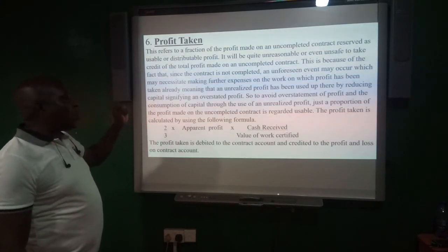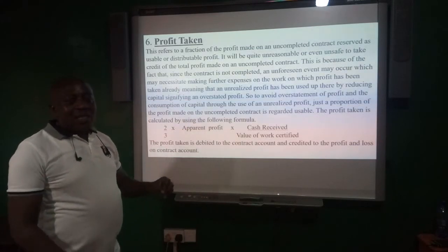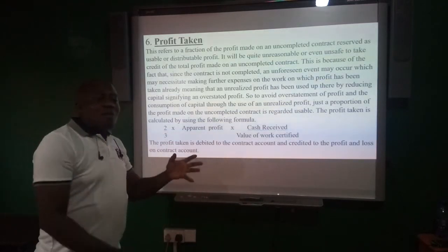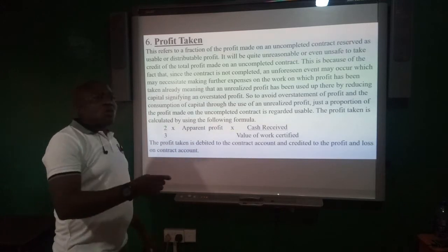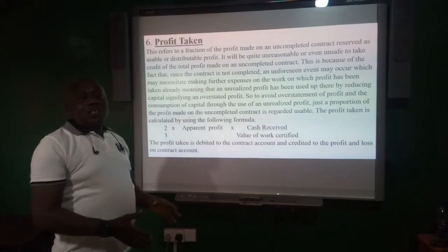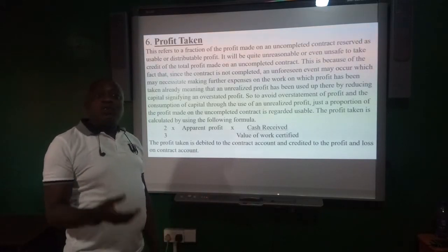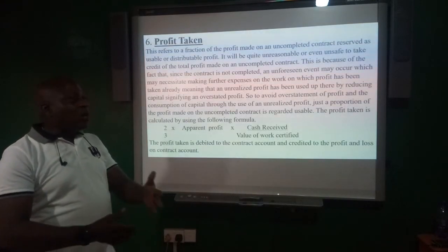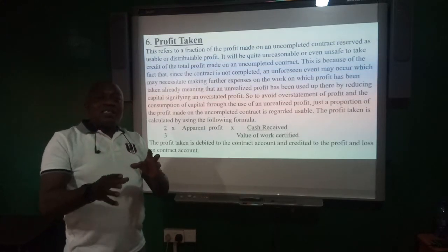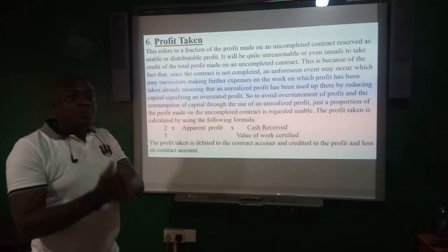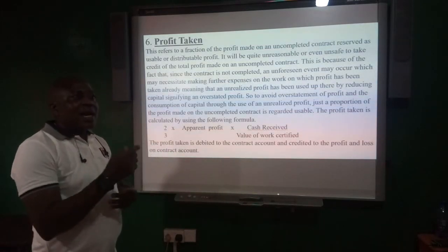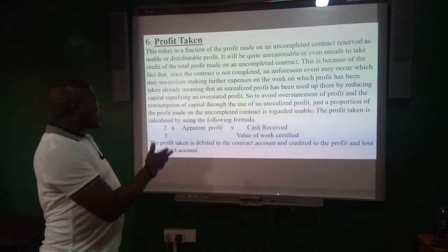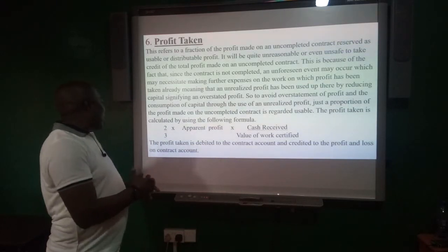I want to go over this one. Profit taking. All that I'm trying to tell you is that since you are to execute a contract which may transcend over several years, you cannot say, oh, if I finish, I'll get this profit, so now I'm taking this profit out. If you do that, when something happens in future, it's going to affect the contract. So there is a formula you have to use so that you can take a profit out of the work that you have done, so that some of the profit will remain till you complete the work and then you take all your profit. So the formula is, you look at 2/3 of apparent profit times cash received over the value of work certified.